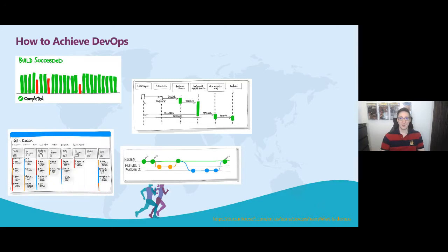For the planning aspects, it's very important that you're not just planning, yeah, we're going to develop A, B, and C within the next 3 months, but rather you break it down into smaller bits and pieces. You're saying, we want to develop a small file upload functionality, we want to develop a rating system, etc. So you're making it into smaller pieces that can be worked on within a smaller amount of time, so that you can plan what you are going to work on right now.